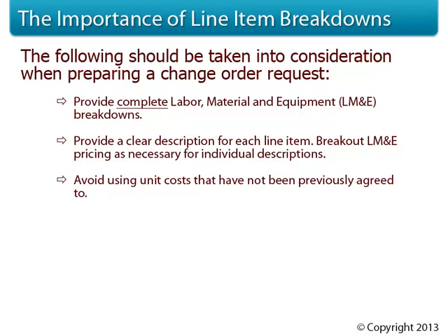As I mentioned earlier in this course, owners, CMs, and GCs are not experts at the subcontractor's work. This means that they're probably going to forget and/or underestimate a lot of things in the peer review estimate that they provide. Experience has shown that estimates prepared by GCs, CMs, and owners are routinely lower than the estimates prepared by the subcontractors. Don't fall into this trap. Provide sufficient information that the reviewers and approver don't need to do their own estimates.